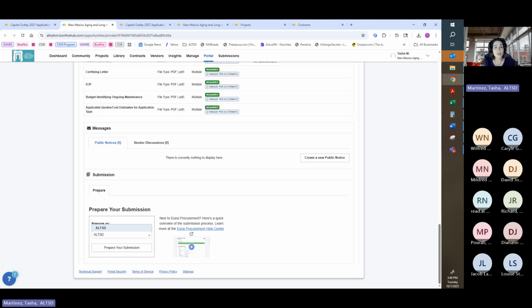You can let us know the difference, and I'll make sure that our scorers know the difference. Now, if you've added 100%, we're going to question why you're asking for that amount. So make sure that the amount you're requesting falls pretty close in line with the quotes and estimates you're giving us. We need to know where this is coming from. That's why we want to make sure you have enough time to reach out to contractors and providers for quotes, so you get as accurate an amount as you can. We do understand that prices have shifted and will shift until you get that funding source. So please make sure that you're padding it by 20%.